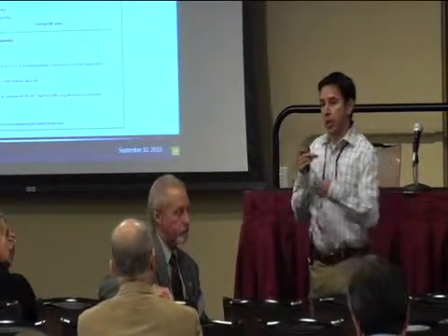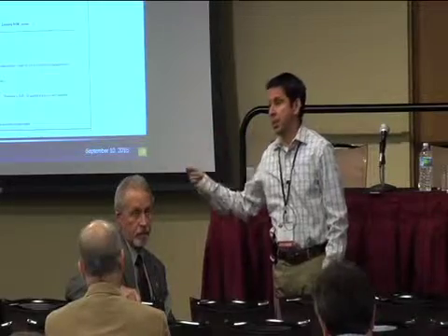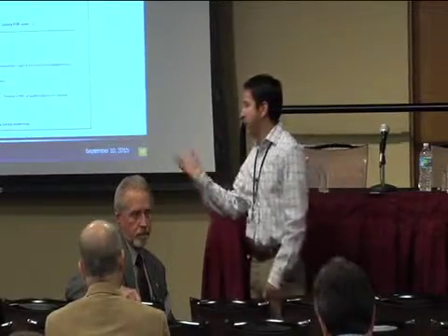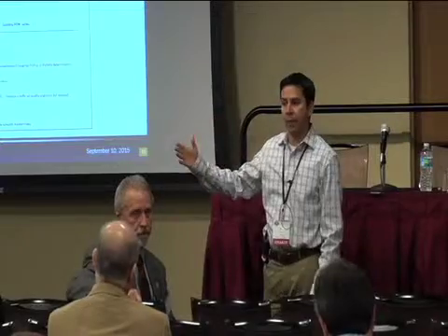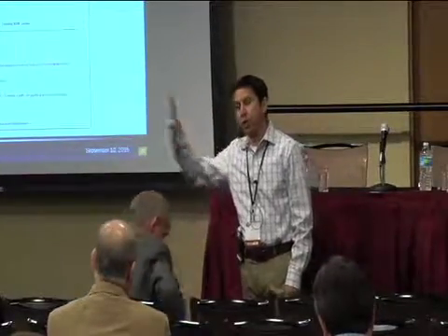one of the early things you want to know is what level of documentation is needed for your study or for whatever project it is. And I think that's one of the habits that we've kind of gotten into, but if you read NEPA, an EA is essentially an assessment to determine if an EIS is needed. And we've gotten in that kind of habit of saying that's an EA, and then you kind of expect a FONSI, but the process is supposed to run out and let you know if you need to go to the impact statement, or whether your EA can end with the finding of no significant impacts, and that's the way we go.